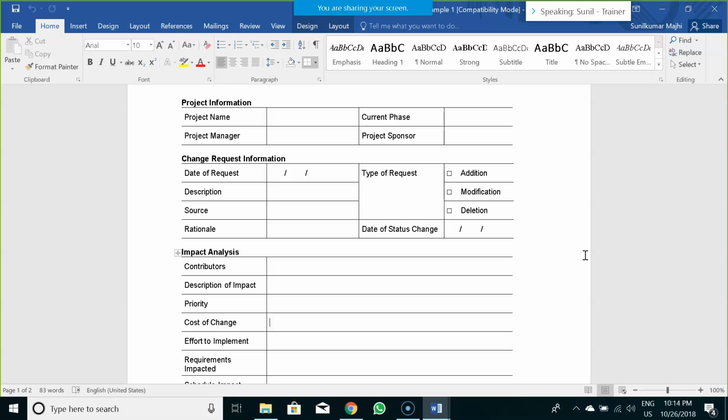It is not something like you have to change a color of the text box, or do some data fixes from the backend, or if there are some missing element you fix, those kind of things. These small things are called as work orders. But change request is like you have to altogether customize something basis on the existing system, or you would like to include a new feature or modify an altogether existing feature. Those are called as change request. Else they would be considered as work order, defect, issues, or any of those small items which are present.